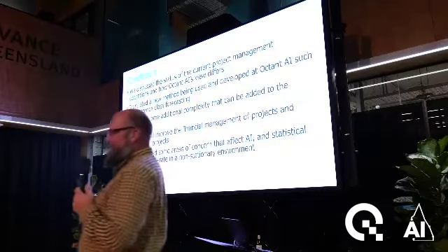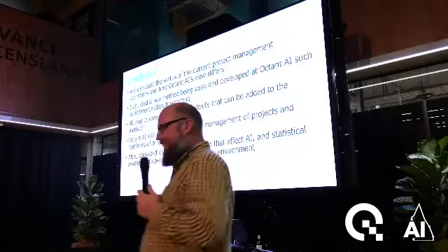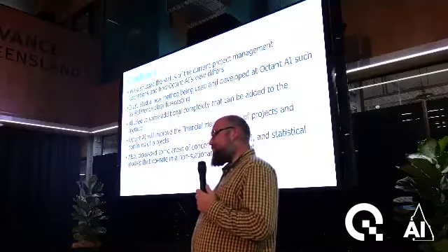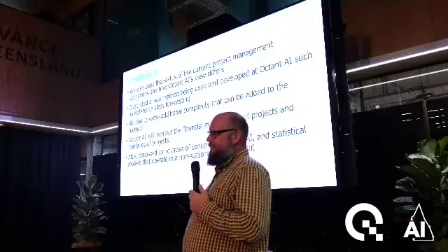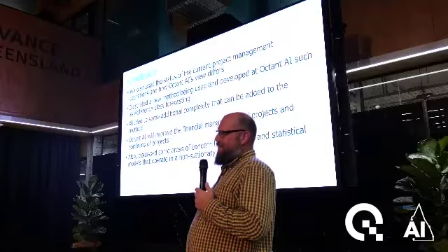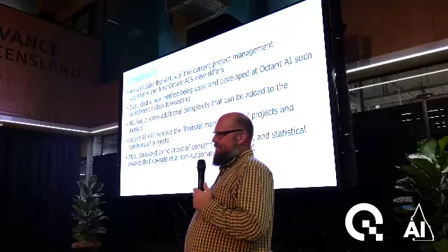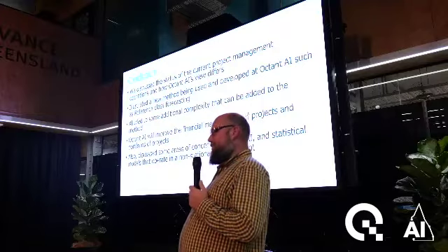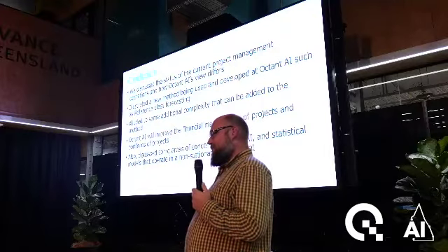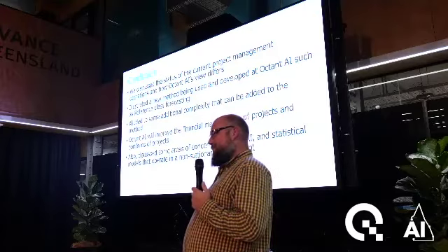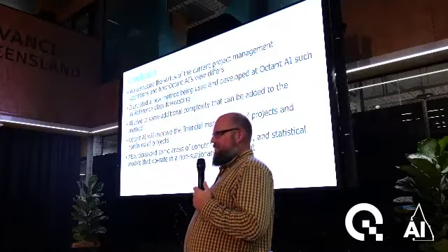What you do is you obviously have a words conversation with them about what all the inputs are, and then try and build a graph model that says these are the ones you can actually control. Then you can use the graph model to replicate the data you're getting with the current model, and you have some sort of causal story that you can tell: for this project, there just wasn't anything you could do about it because there were extrinsic risks.